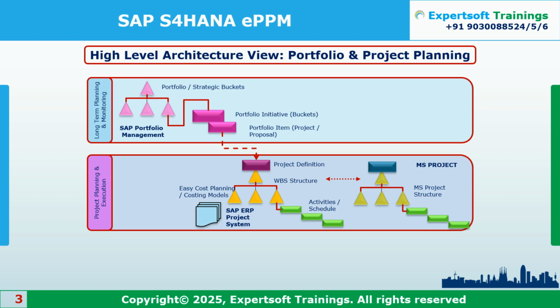Okay, from that, whatever budgeting you do on a yearly basis, you can transfer back to this program level. From this program level you can transfer to the project levels. But for that we need to write some code, because we don't know for which project how much percentage you want to transfer. My values may change every time.